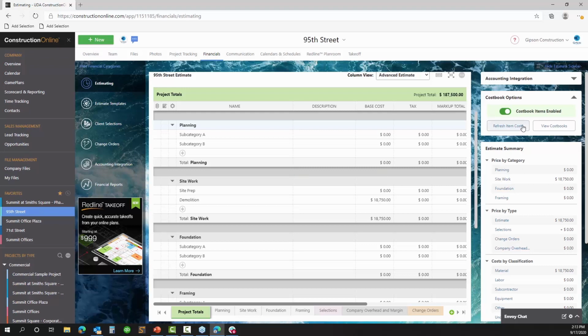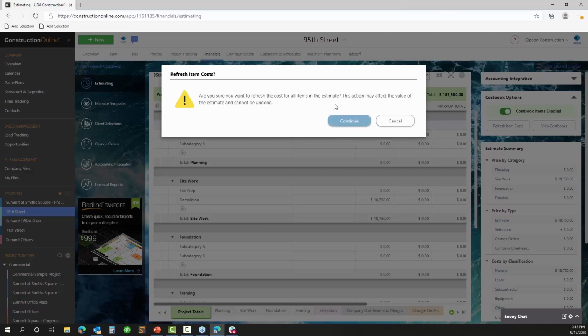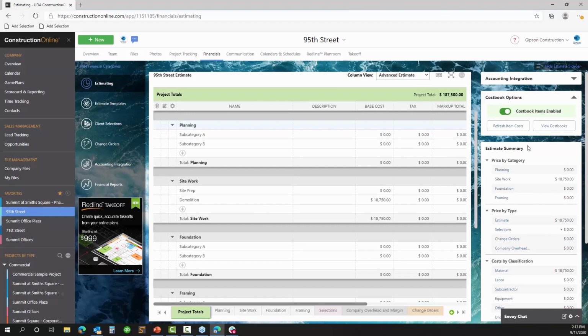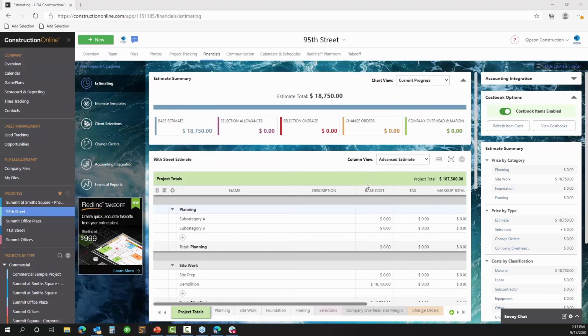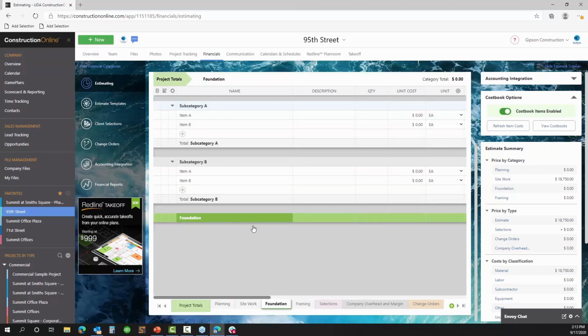Yeah, Holly, this is a really relevant topic. I was just speaking with a client yesterday, and well, it's not just one client I've had this conversation with, but lumber prices have been so variable. I mean, the prices and quotes are changing day to day to day. And we were discussing how it's very critical for their estimators to know what the most recent quote was. And oftentimes, that leads to having to contact different supply yards or different lumber yards multiple times a week. Well, if one person contacts the yard and gets a price update that's, let's say, just a little bit higher than what's currently in the items database, they can actually update that item's cost within the database, and then the next person in line can pull the most recent pricing data.